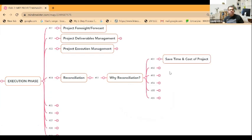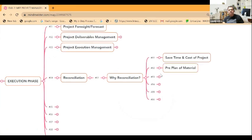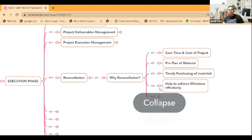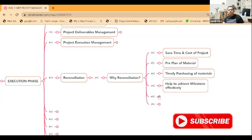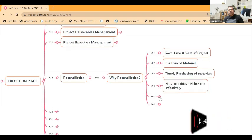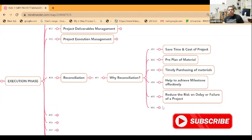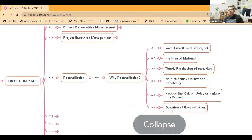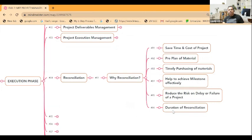That's the reason I mentioned this reconciliation part. It will save time and cost of the project. Basically, you have to pre-plan for your material. Timely purchasing of the material helps to achieve milestones effectively if you do the reconciliation periodically. This will help you save time and cost of the project, reduce the risk, delay, and failure of a project. What is the duration of the reconciliation operation? As I told you, maybe within one month, three months.